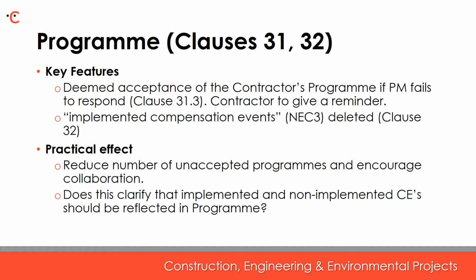Turning then to the programme, clauses 31 and 32, there are two key changes to identify here by way of key features. Firstly, that NEC4 now provides a mechanism for deemed acceptance of the contractor's programme if the project manager fails to respond to an issued programme for acceptance or fails to respond to a reminder. The contractor must give the project manager a reminder, and if he doesn't reply to that notice, then the programme is deemed to be the accepted programme.